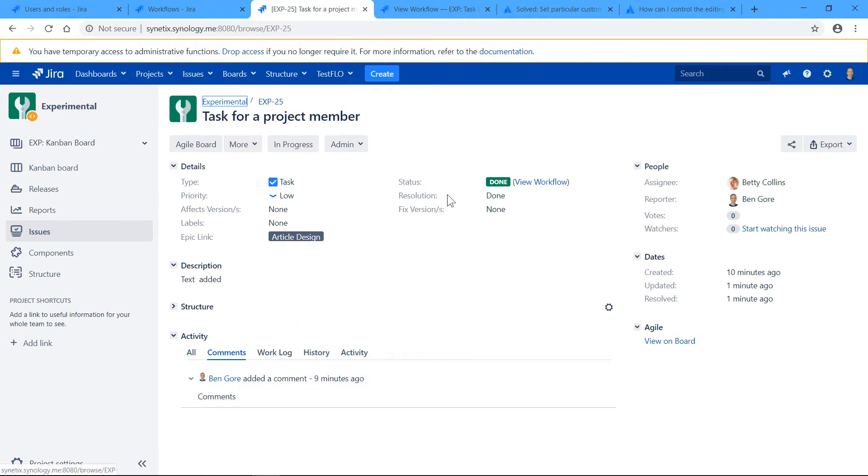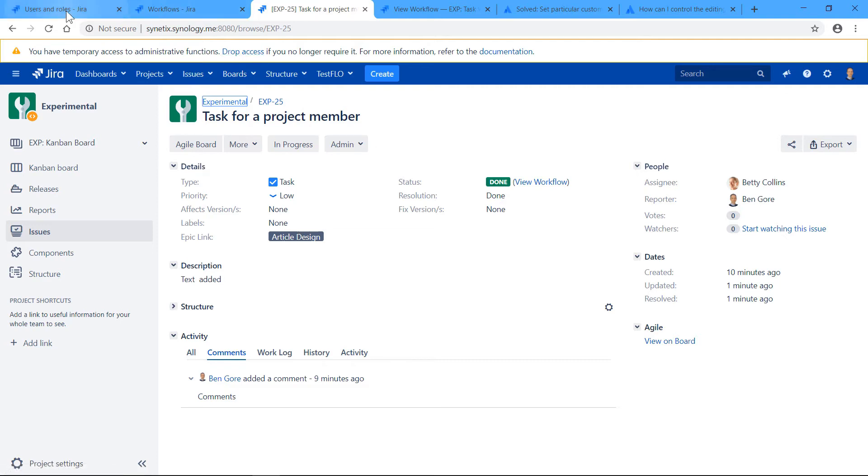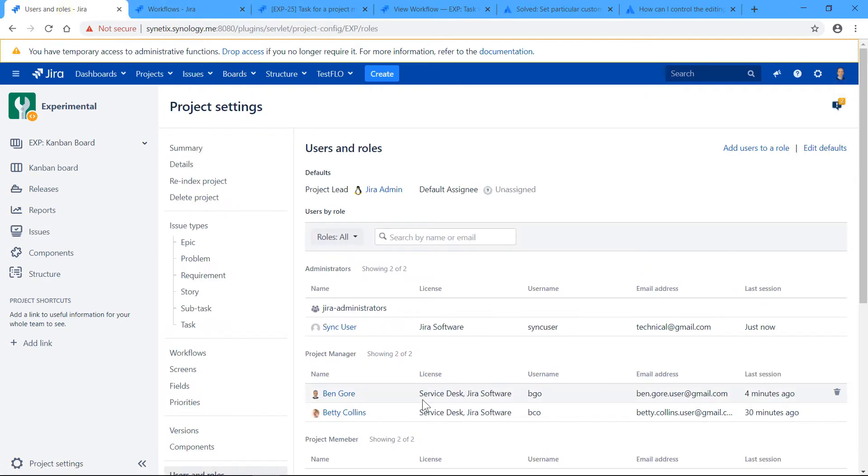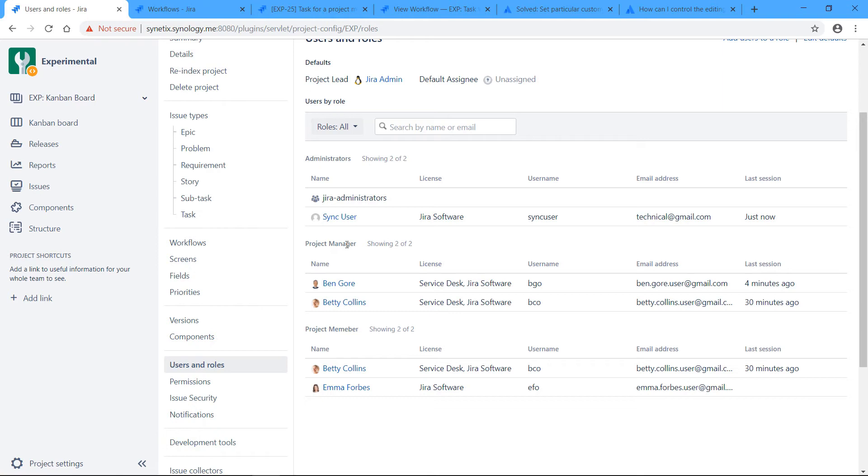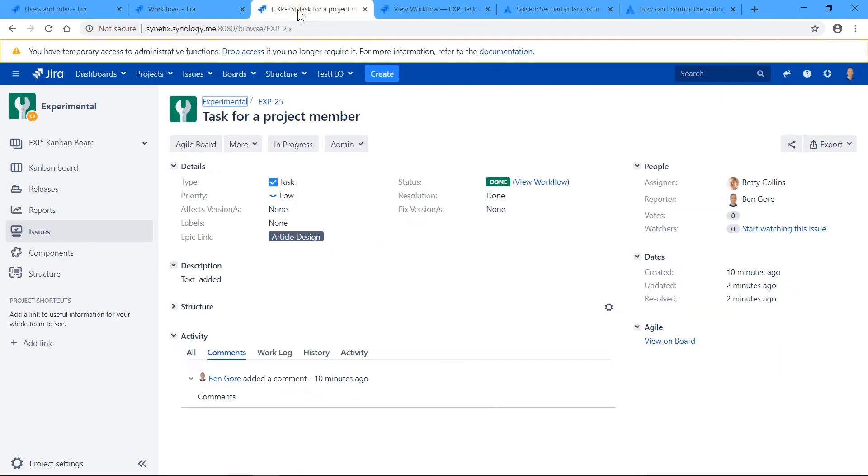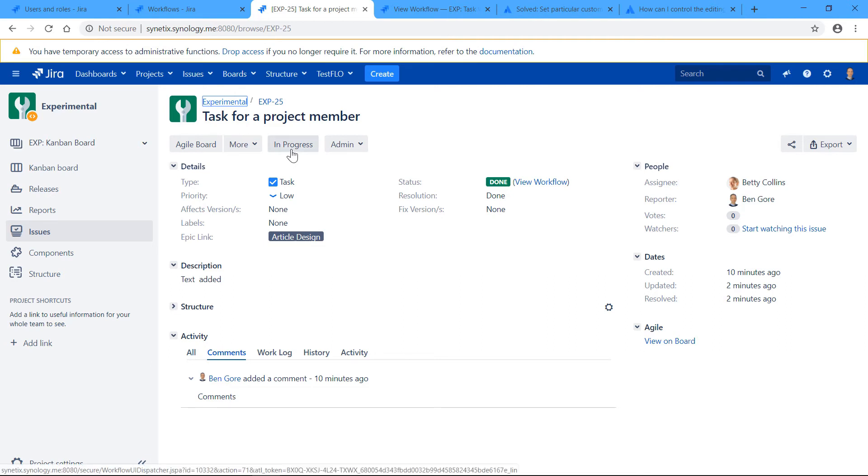And in this way, I am sure that all other users that are assigned to project member role will not be able to change that. And I, as project manager in this role, also will not be able to change anything. However, if I'm in the role of project manager, I have this button available that I can reopen the task.